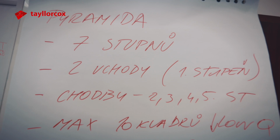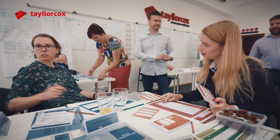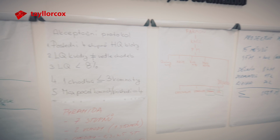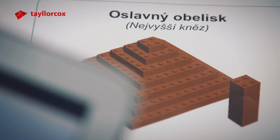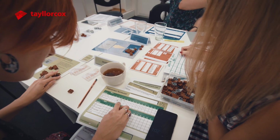The team built today a visual management system. What does that mean? They built a whole set of flipovers along the wall to show the business project planning, the quality requirements, the risk matrix, the status, and even the business value that had to be realized. Everybody was able to see in one snapshot the visual status of the project. And this helped them with their dialogue, with their discussions, with their understanding and prioritization.